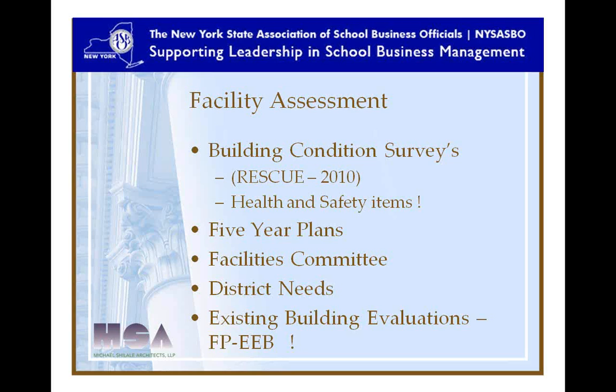You'll have your 5-year plans that have to get submitted with every capital project, and you would have done those as part of your RESCUE survey as well. Your facilities committee addresses some needs. You have district needs that come from others involved, and you have another item called your existing building evaluation, which anytime you submit a building application to SED, you have to do this existing building evaluation, Form FPEB.